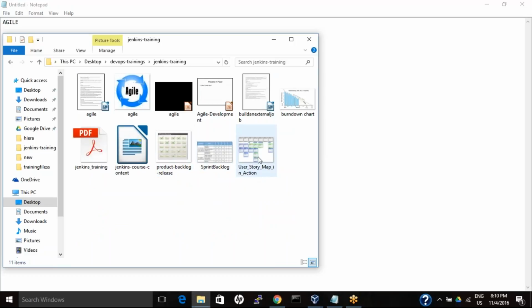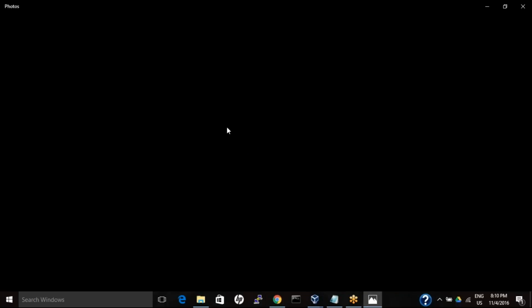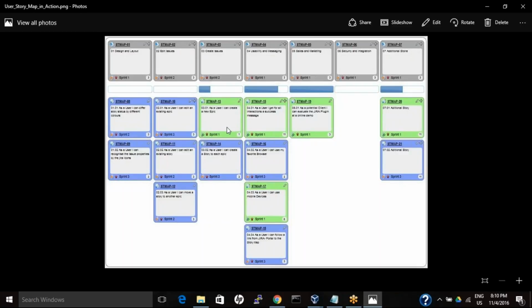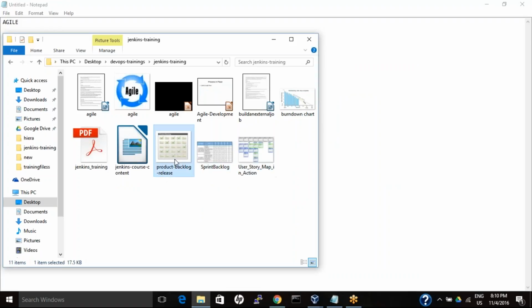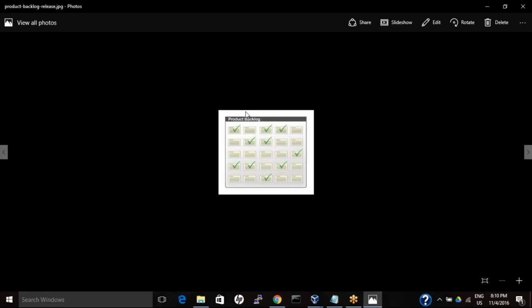These are your user stories. This is how you map your project details when you have a client call. You have 21 user stories. You have discussed 21 things with your client, out of which you're selecting a few. That is what I'll show you. Now the product backlog. I have lots of user stories, out of which I'm picking the user stories which are going into development. Clear?